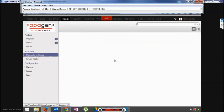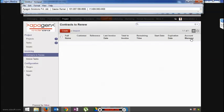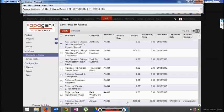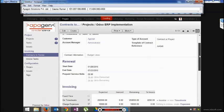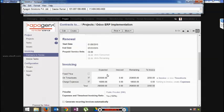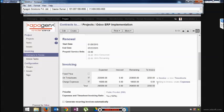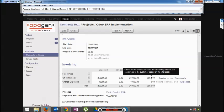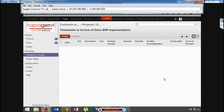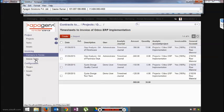We'll go to the contracts and see what is the update here. In a particular contract we can see that based on the pricing, now 30 man-hours were used, so you can see that it shows 30 units consumed, 20 remaining. Based on the invoicing, it says how much timesheets, what is the expected, what is the remaining, and what is the invoiceable. So basically invoiceable means because we have created some timesheets and we would be able to invoice. So in case today is the date for invoicing, I can come here, I can click on invoice, and these timesheets could be invoiced. It tells me what are the timesheets to invoice for Odoo ERP implementation.